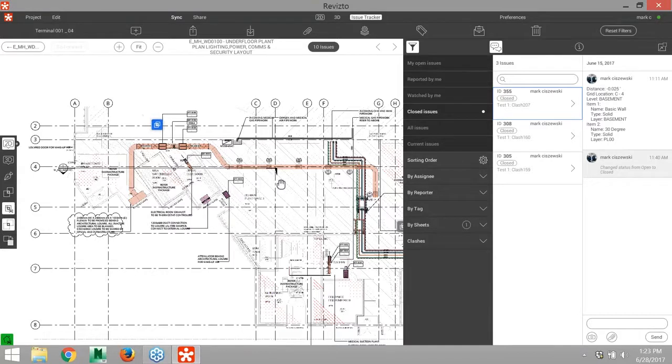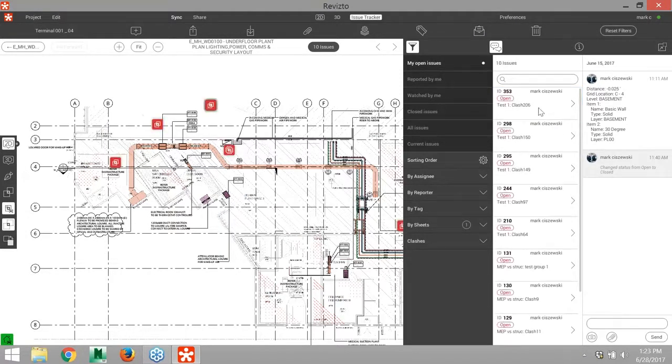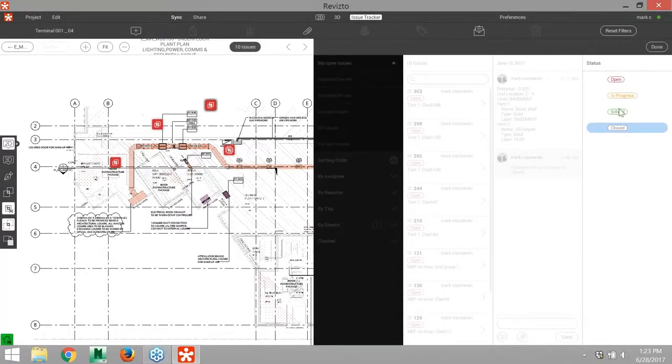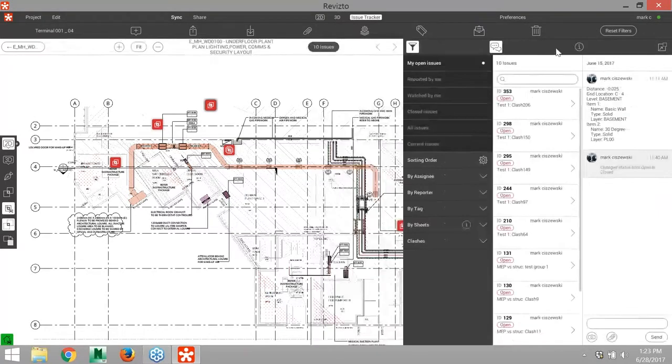But the cool aspect of that is, when you open up Navisworks, there'll be a resync for clash detection. It's going to check the model and verify if those issues have been addressed. These issues will be closed out, and they'll go into your closed issue folder. The name of the game has always been to eliminate these clashes and get them closed. Most firms, once they solve them, put them into the solved category underneath the I button, and then somebody with management credentials or a superintendent comes through, verifies it's done correctly, and closes that out.